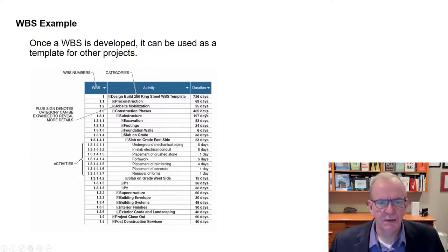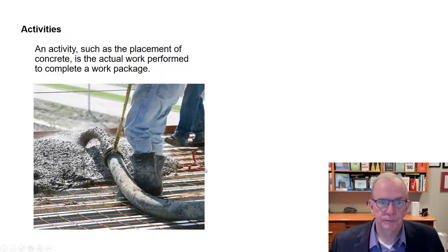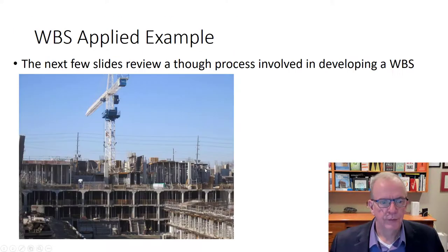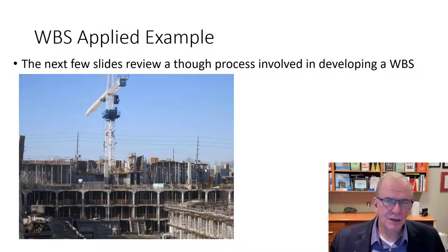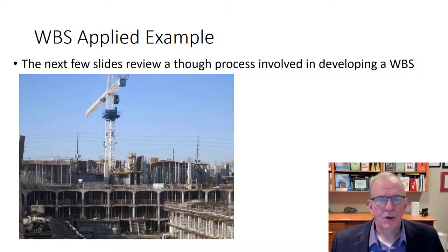Like at this level, I can't really measure unless I've been updating things at the lower level. Then I can measure. Then I know. I know if something's supposed to take 6 days and I'm about 3 days in, am I about halfway done? That gives me a good calibre to measure with. If it's 460 days, and I'm at day 230 on the project, am I halfway done? It's harder to tell.